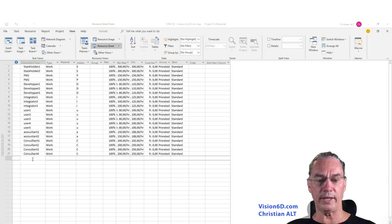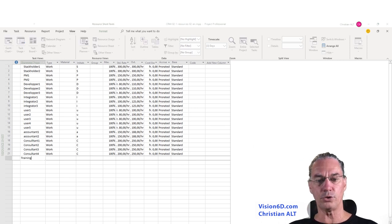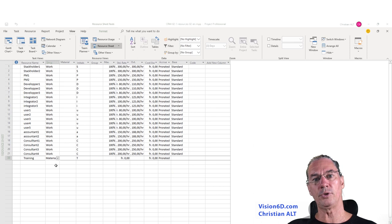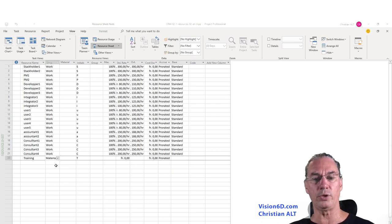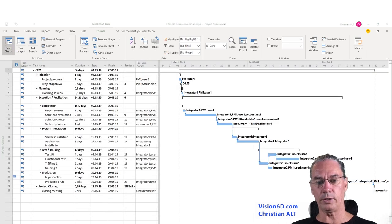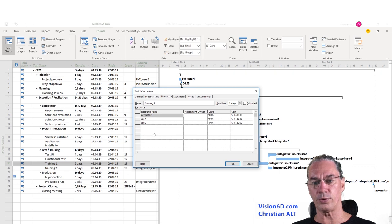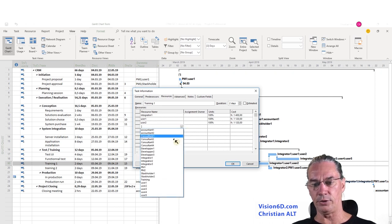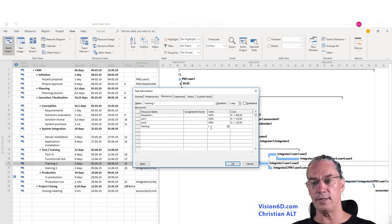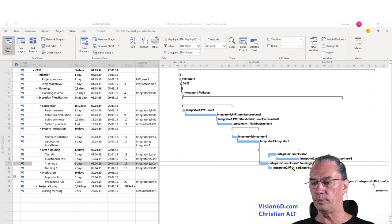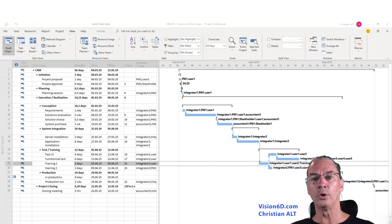I would propose we handle the training resource in a different way. The training is a resource by quantity, so I'm using the type material. The material is one unit per day. Going back to the Gantt chart, I double-click on the training and find the resources there. I now add the resource called training and I need two days of training. After clicking OK, you see on the graph, added on the line, training with square brackets and the value 2 — meaning two units of this.